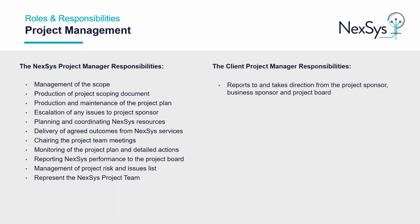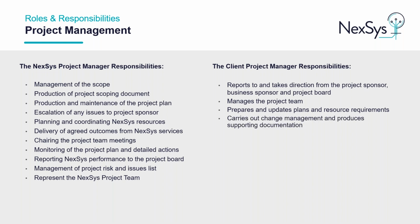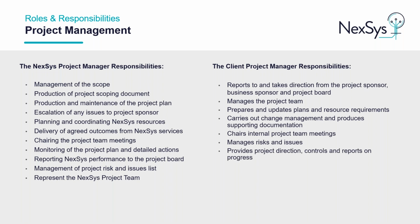The client project manager responsibilities are reports to and takes direction from the project sponsor, business sponsor, and project board, manages the project team, ensuring outputs are produced to time, cost, and quality, prepares and updates plans and resource requirements, carries out change management and produces supporting documentation, chairs internal project team meetings, manages risks and issues, and provides project direction, controls, and reports on progress.